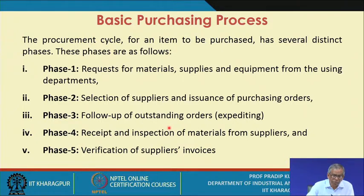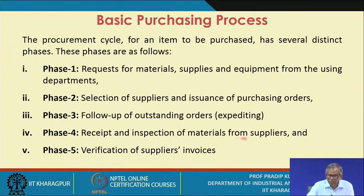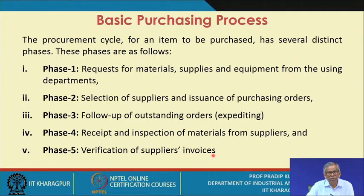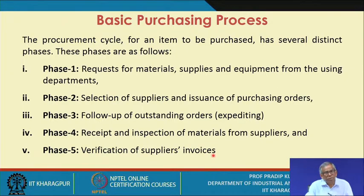Once the follow-up is over, you receive the orders, and once you receive them, you go for inspection of the materials at your workplace. Receipt and inspection of materials from suppliers is essentially phase four. At the last phase, phase five, you verify the supplier invoices and instruct your finance or accounts department to make the payment. Making payment is not the responsibility of the purchase department, but based on the purchase department's recommendations, the finance department is responsible for making payment. All these phases we will discuss in detail.